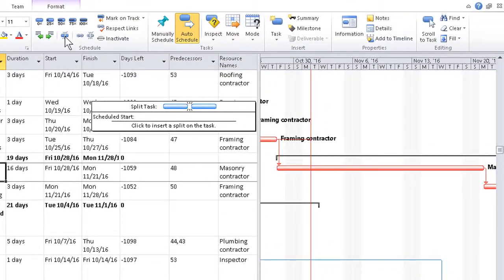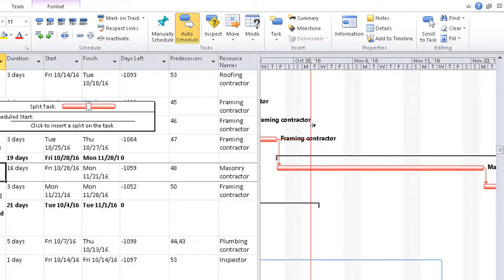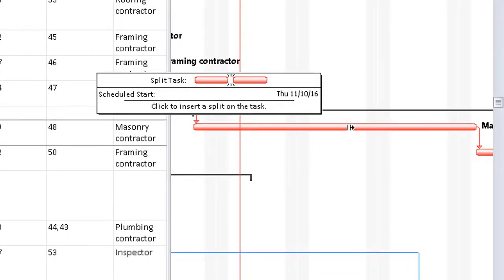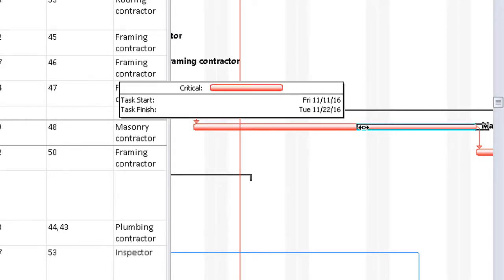This time we click and drag — that is, hold down the mouse button — and again watching the start date in the box, we get it where we want it time-wise, then let go.